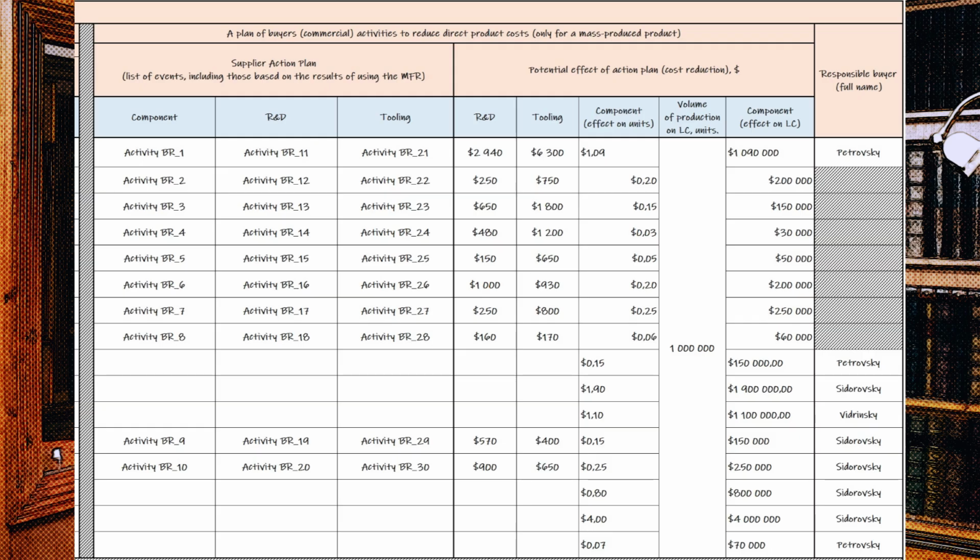Regarding the compliance of the BOM with the requirements of criterion 27 and 28, I believe no additional comments are required in this case. Depending on the requirements of the project manager, the degree of complexity of the product, and the current milestone of the project, both a single currency BOM, in this case the main currency is a dollar, and a multi-currency BOM can be formed, with all corresponding advantages and disadvantages in the form of the need for manual updating the exchange rate for automated BOM executed in a tabular editor.